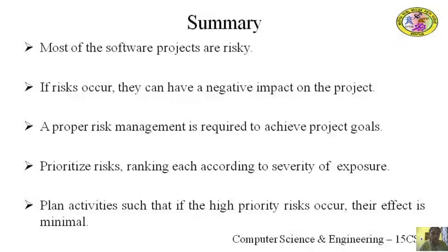Rigorously watch for surfacing risks by meeting with key stakeholders. As practicable, split larger risks into smaller, easily recognizable and readily manageable risks. And then plan the activities such that if the high priority risks occur, their effect is minimized.